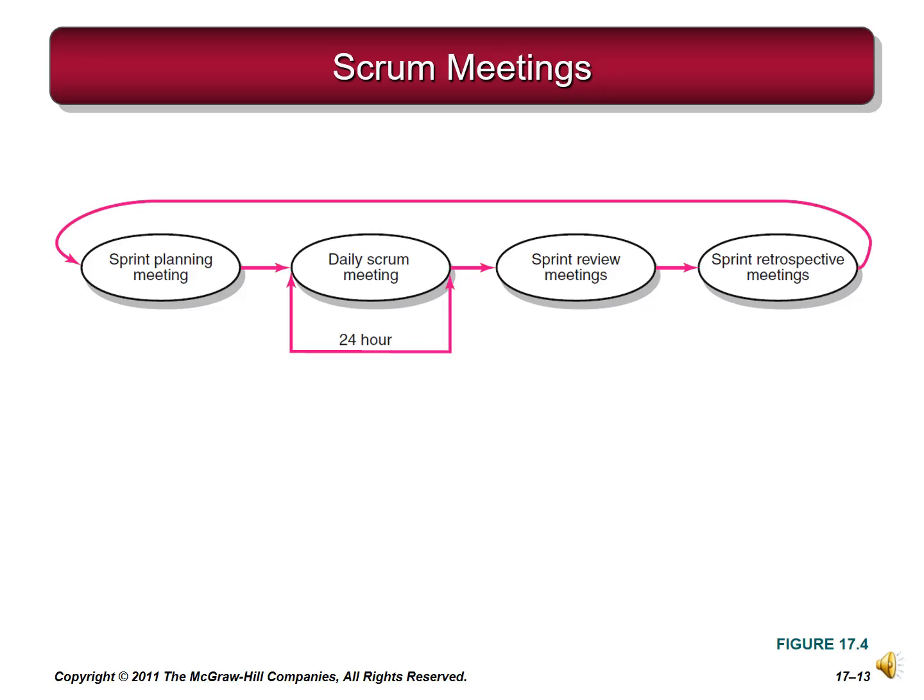The Scrum, which typically lasts 15 minutes, is held next to a whiteboard, at which time all tasks and blocks are recorded. The Scrum Master erases blocks once they have been removed. The meetings must start on time. In some cases, a late fine is collected by the Scrum Master and donated to charity. At least that's what the authors state. The meeting is limited to just those 3 core questions. Members stand to create a sense of urgency. Immediately afterwards, specific members may meet to resolve issues offline that have surfaced.